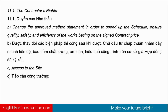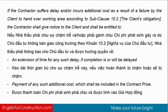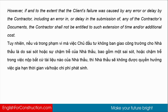(c) Access to the site: If the contractor suffers delay and/or incurs additional costs as a result of a failure by the client to hand over a working area according to Sub-Clause 10.2 (the client's obligation), the contractor shall give notice to the client and shall be entitled to an extension of time for any such delay if completion is or will be delayed, and payment of any such additional cost, which shall be included in the contract price.